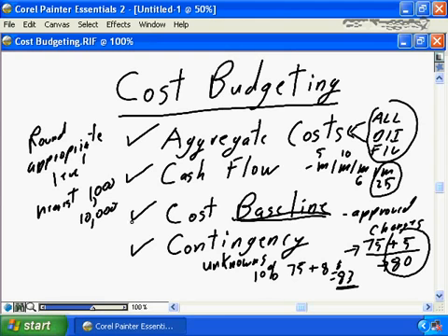If you develop a cost budget that says my total project budget is $75,000, $321.19, no one is even going to look at the lower level numbers, and it gives a false impression. Instead of being measured, that your project delivers in the range of $75,000 or more appropriately in the range of $83,000, they're going to expect your project to deliver down to the dollars and cents. So you need to round your budget appropriately.